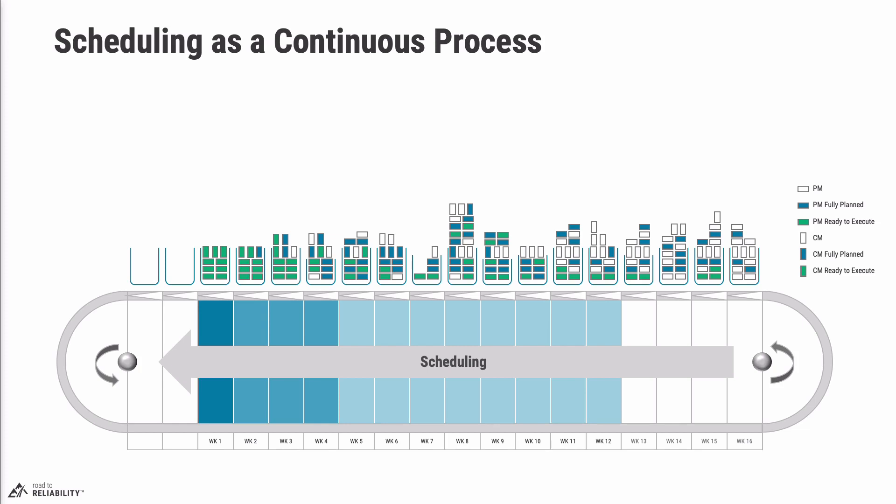One of the things we want to see on this conveyor belt is that we only want to see green blocks in the current week, and mostly green in next week — week 2 — and the week after. As you look further out, you'll see less and less green and more and more blue: less work is ready to execute and more work is fully planned but waiting on parts. Further out, most of the work is white, meaning it still needs to be planned.